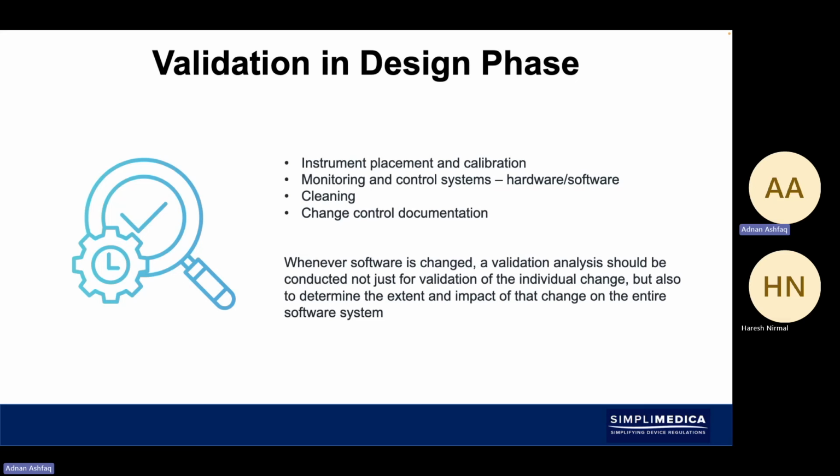If it's a customized machine which is being developed, you might have to have a change control system being used. So typically, in your own quality management system, you can use your change control system to document a piece of equipment that's gone through factory acceptance testing and been officially signed off, but then you need to make some changes in the equipment, and then you should use your QMS for this.